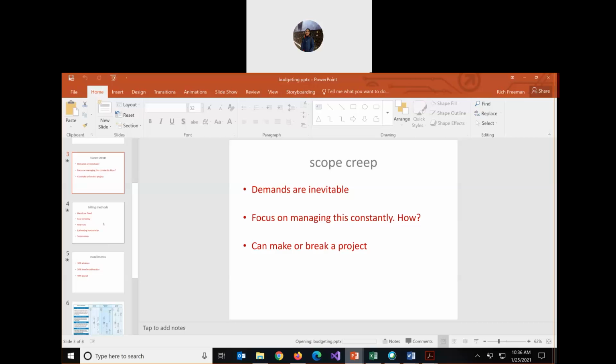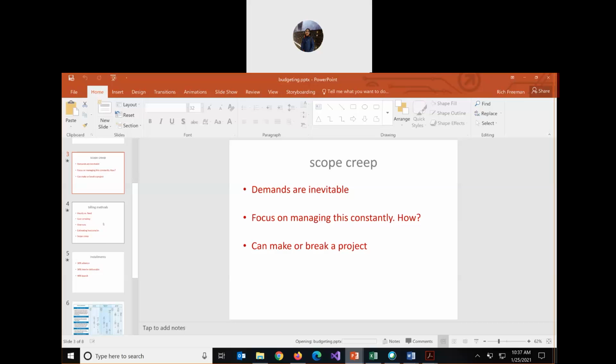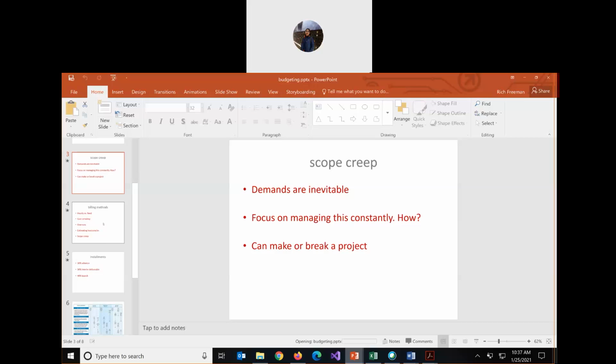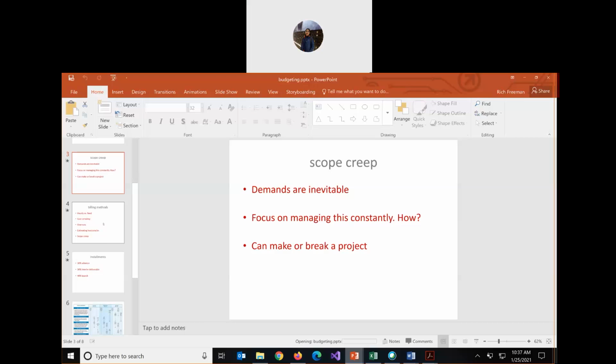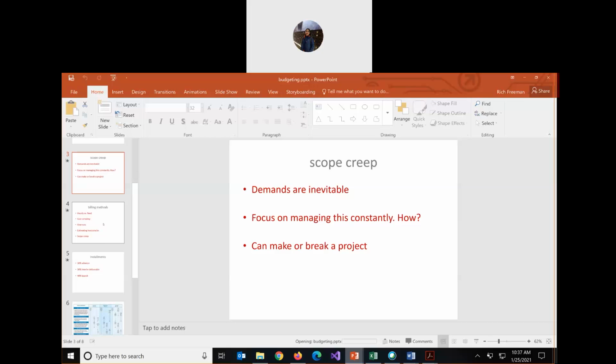Absolutely. Yeah. That's why your proposal, what I'm having you do for assignment 1, has to be really clear about what work you're agreeing to do. Because if it's very vague, your customer is going to say, oh, well, I asked for this, but it now needs all these other things, and I don't want to pay extra. So your proposal has to be really clear. We're doing these things. And if you want something else, we'll do it, but we need more time and we need more money. Yeah, when we are freelancing, we'll get the work from our connections. But even if we have a proposal, we cannot say no every time.